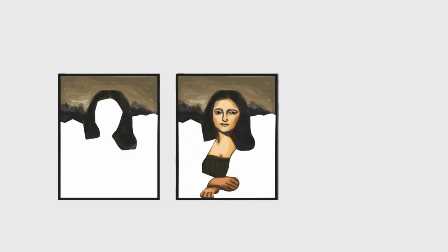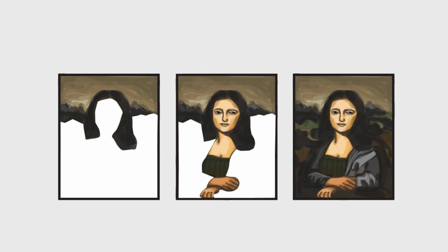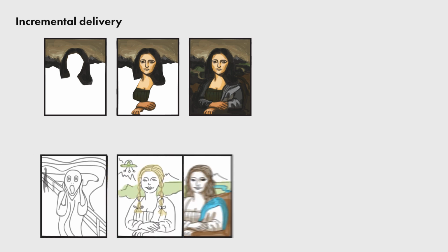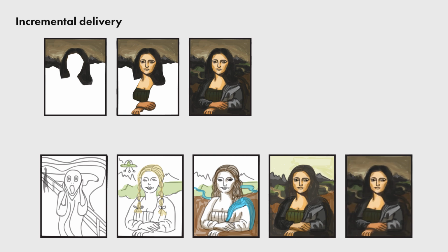When you start a project and you can see the end picture of what you want really perfectly well, you can plan all the details, you can have a plan-driven process, and you end up with what you wanted, then that's an incremental process where you deliver piece by piece. If that picture has actually changed, then you need to have an incremental and iterative process.